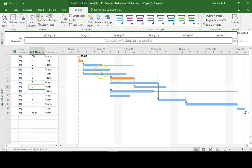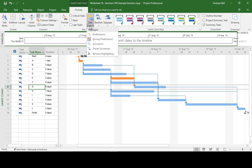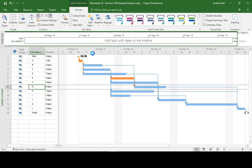And actually it was Task B that's the non-critical task that's got some float. So the driving predecessors. I can remove all highlighting like this.